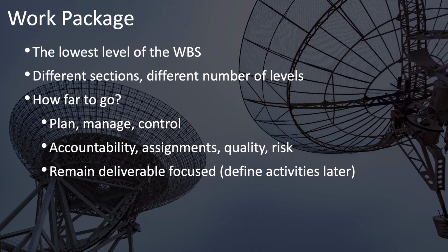It needs to be broken down enough that these work packages can be assigned to people or groups or organizations, and you can hold them accountable. Enough that you can properly manage and control and measure quality and risk on all of this project work. As you do this, make sure that you remain deliverable focused in your breakdown. If you find that you're reaching the point that you're starting to use activities and verbs that represent activities in your work breakdown structure, at that point you've gone a little too far. But don't worry, those activities do need to be done and will be defined later and connected into the work breakdown structure at a later point.